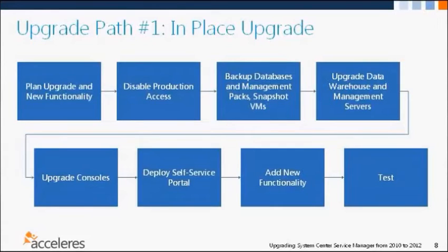Hey Nick, I just wanted to jump in and comment, because we've seen this, and maybe you'll want to explain a little bit, but what we've seen some customers do is when they want to do an in-place upgrade, they will actually replicate their 2010 environment in a lab and then run the upgrade on that 2010 lab environment to essentially stage the whole thing so that they can plan not only for the rollback if they need to do it, but they can also then work the functionality out in the lab. Of course, they then have to be able to do that whole thing over again in production when they do the in-place upgrade. Yeah, that's an excellent point.